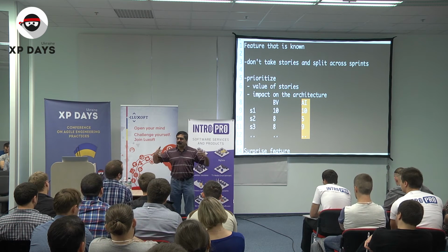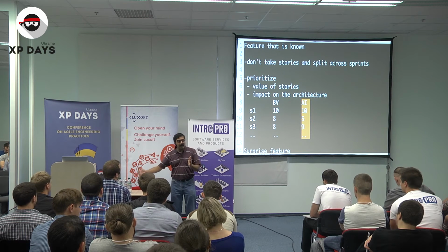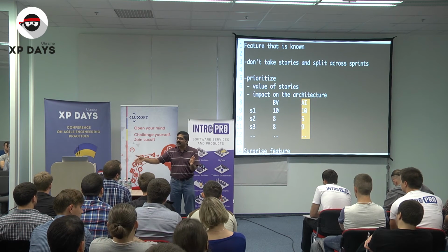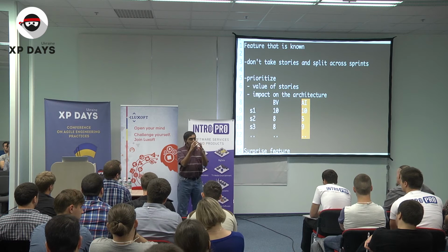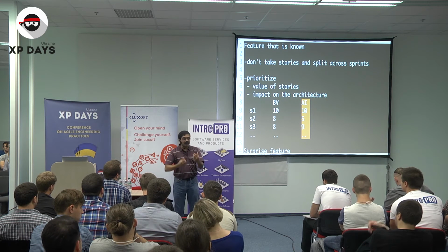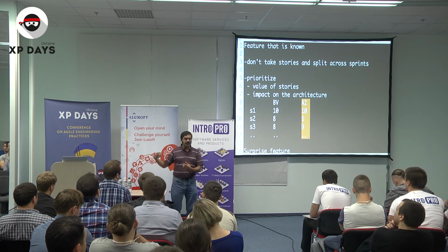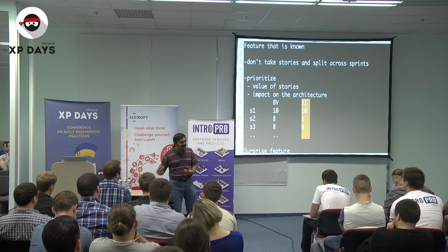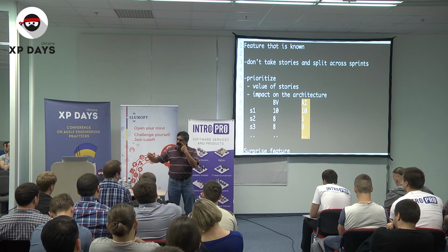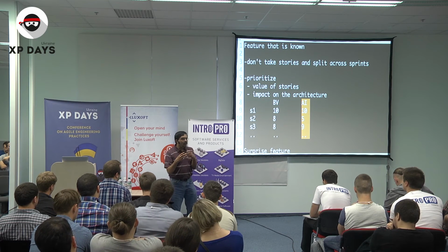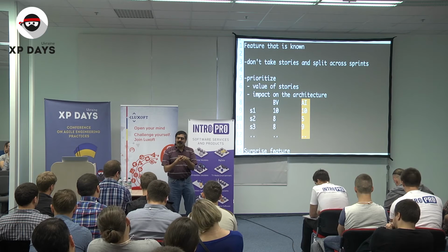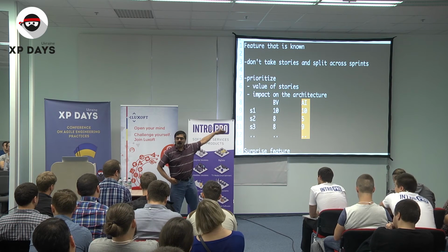We need to have a planning where at least a sprint and a half before a sprint starts, the business people, the customers, as I call them, business analysts, and technical leads from the team, I'm not using the word architect here, but technical leads can sit together and they arrive at the estimation based on the prioritization.